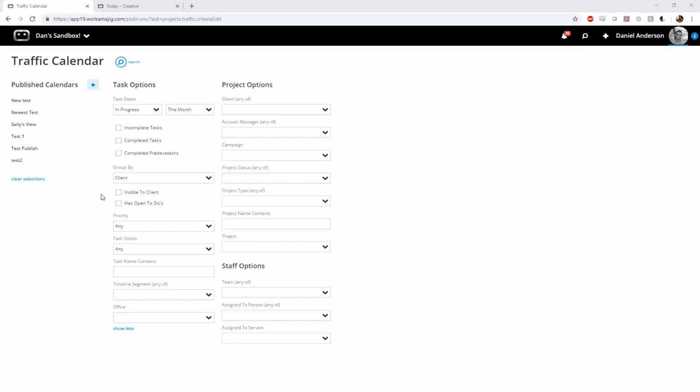Okay, and a question here from Mandy regarding generic tasks at the beginning of your schedules that last for the duration of projects for our project managers and some others. Is there a way to leave those out of these calculations? There is a way to leave them out, but it's also going to be based off the scheduling. If you have the schedule task option selected for it, then it will pull into here. If you don't, it won't. That's something you can see in the task details at a project level.